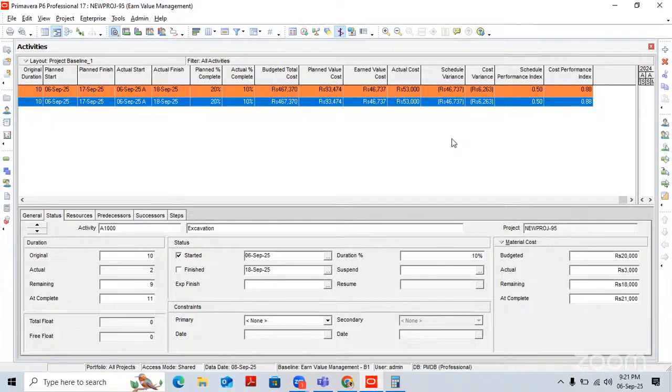If the ratio is not as per the company's benefit, then they need to recalculate the cost, check the methods we are using, do value engineering again, and control their cost. Now, for 10% of progress, you are going to spend 6263 extra.